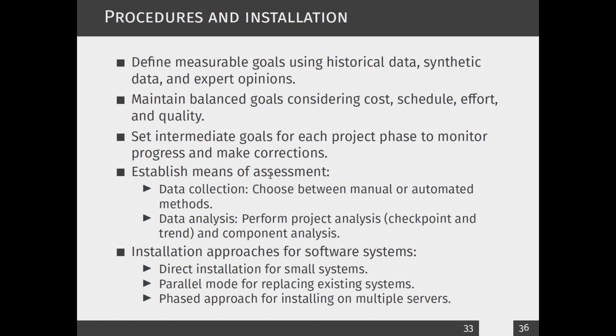But when it comes to procedures and installation, we have to define what we call measurable goals. And when you're defining measurable goals, you have to use historical data, synthetic data, and also expert opinion on this. And then you have to maintain balanced goals. You have to consider cost, schedule, effort, and quality.